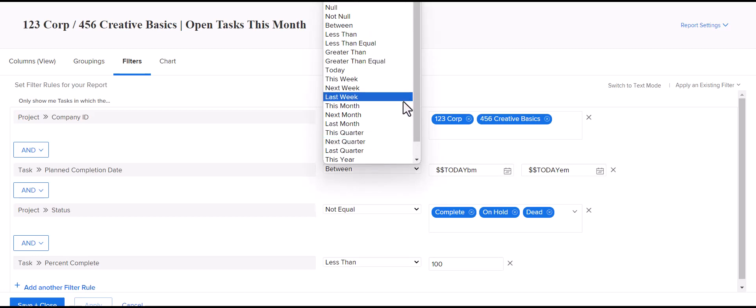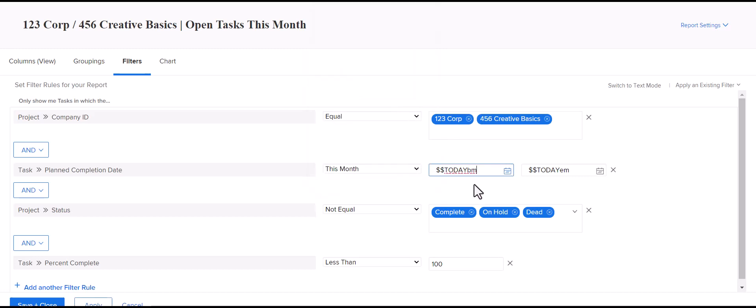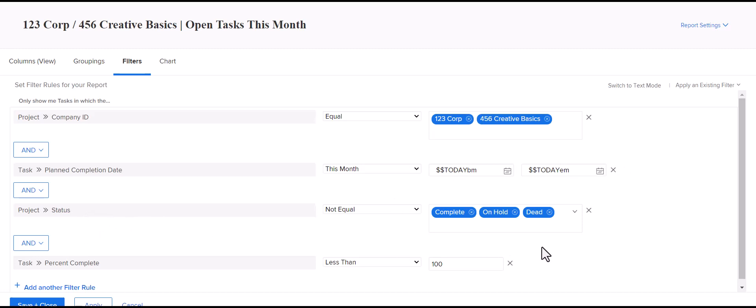So when you select that, you'll see here in the filter, it automatically adds in the code for today, beginning of month, and then today, end of month. That the project status is some form of open and that the tasks are less than 100% complete. That filter is amusing for this one.